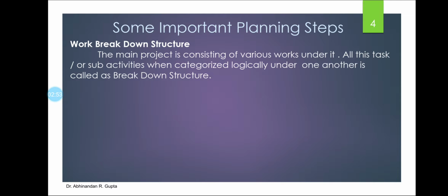There are some important considerations. First is related to the work breakdown structure. As you all know, one big project consists of various small tasks or work that one needs to conduct. Like if you take the example of construction, constructing a particular building consists of various sub activities. If you broadly divide it, it is divided into 2 parts, substructure work and superstructure work.